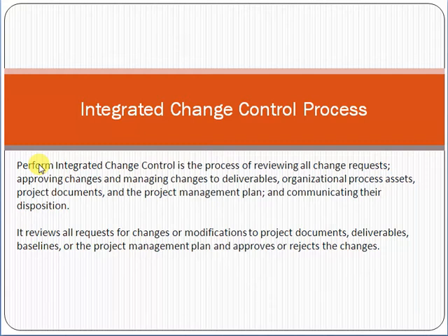So once we compared that requirement and reviewed the scope requirement document, it came to our knowledge that this requirement is not part of the scope document. So we will consider this as a new requirement or change request.